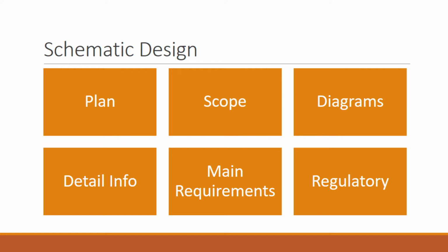However, the following substage should be taken into account to ensure a more precise estimate before a final funding request can be made and where we're going to move on to final design. And as before, a pause for a business decision should be made before moving forward. Now, the next phase may cost 1 to 4% of the total project cost and should not occur unless there is a business case for proceeding.